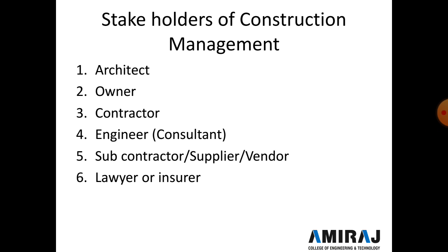The architect is traditionally responsible in both the pre-project and project phases, acting on the client's behalf. In the pre-project phase, they prepare drawings and tender documents, and select a contractor. In the project phase, they are responsible for checking measurements, certification of bills, and overall project management functions. In the case of the public sector, a separate engineering department handles tender preparation and contractor selection.